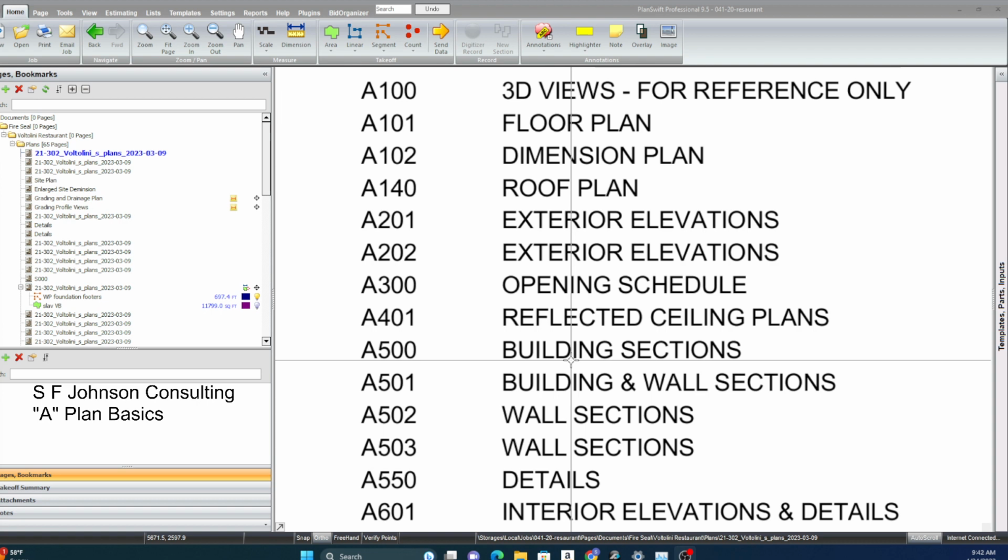That's why it's so vital to be able to navigate through the specifications, know off the top of your head which is your spec, so you can go to that first, review those, and know exactly what you have to do with respect to your scope of work. And for the project manager, that's even more vital. You have to know how to read through all the specs to know what to look for on an estimate for each of the trades. That's very, very important.